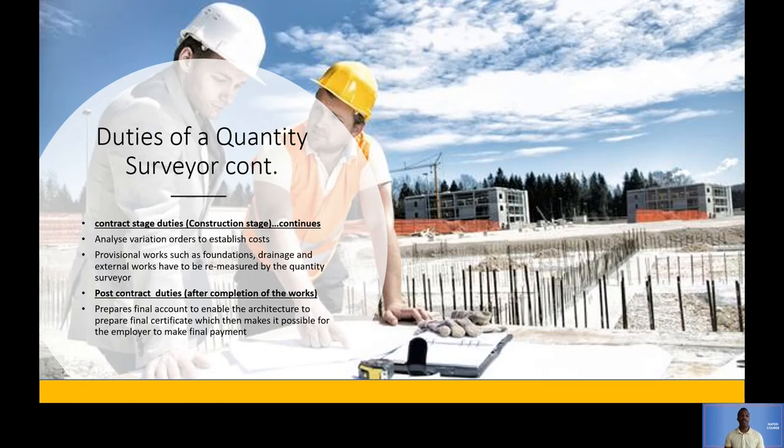And then provisional works such as foundations, drainage, and external works have to be remeasured by the quantity surveyor. So even as construction is going on, the quantity surveyor still has to calculate the amount of material that's needed, the amount of material that's used, the amount of material costs as well, and all of that. That's what the quantity surveyor does during construction stage.